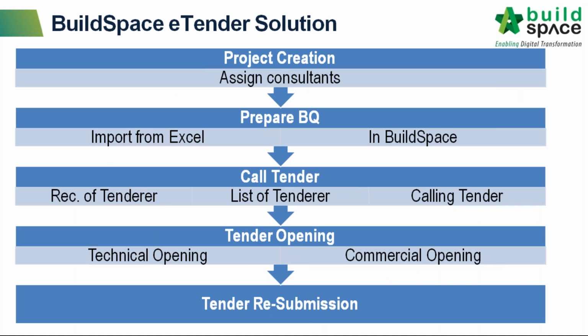Let's say as a client, if you have this system, how you create a project. And then let's say your project, you assign a consultant to call out the tender for you, how you assign the consultant, and then how the consultant logs into the system to import their VQ or prepare the VQ, and also how to call out the tender. And also we have the tender opening process, like technical opening and commercial opening.